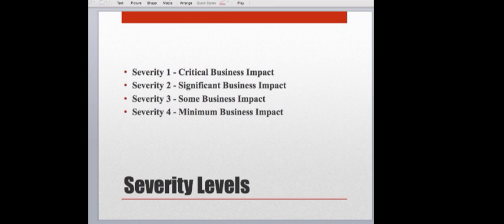I mentioned earlier that people are going to give you requirements during user acceptance testing, and you want to encourage that, right? You want to get requirements from them. What you want to make sure doesn't happen is that UAT gets derailed into becoming a requirement session and you're spending all of the time talking about the future things that they want. When they tell you, hey, it would be great if it could do this, or why can't it do this, or what can we do about this? You want to take those things down for future conversations. So you definitely want to make sure you get them written down.